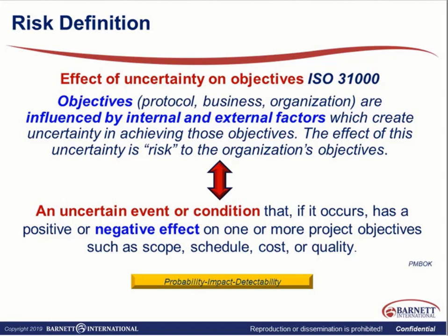Quality control, lack of resources, change in scope. So very good. Also not enough drugs. So now all of a sudden we have patients coming in much faster. We want to make sure those subjects are eligible. We want to make sure we have adequate drug supply at those sites. Also, this could change the scope of work in the sense that maybe we didn't budget for all of this to occur this particular quarter or for this time period. So now that also changes our cost in the sense that now we didn't budget for this, and likewise, we are going to need to have those resources available.